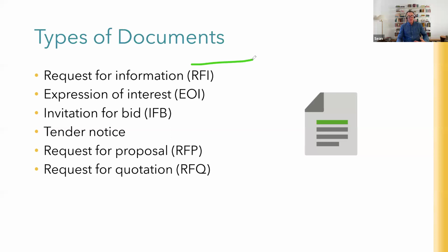Okay, so these are the levels, starting here with a low level of detail going to a high level of detail this way. Once again, though, as I just said, follow your procurement policies in your organizations. Sometimes you can just go straight out to a particular vendor with a purchase order. If it's a particularly small one, you can go straight out to a pre-selected vendor